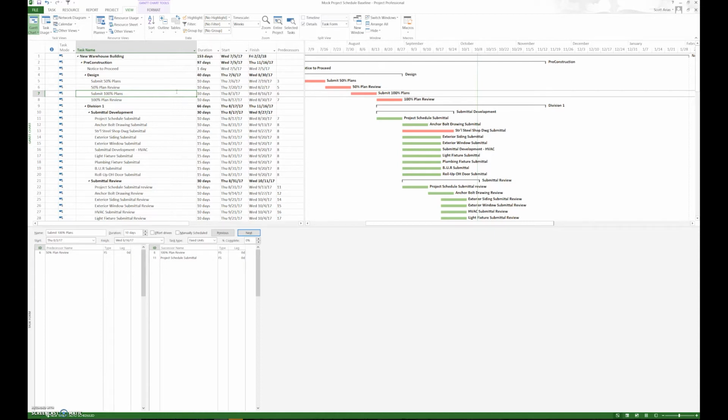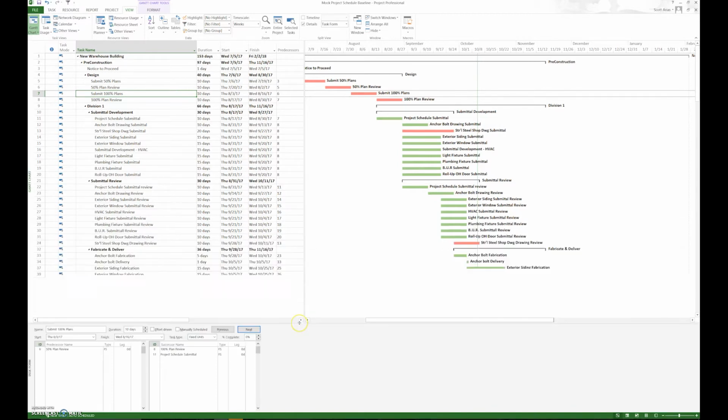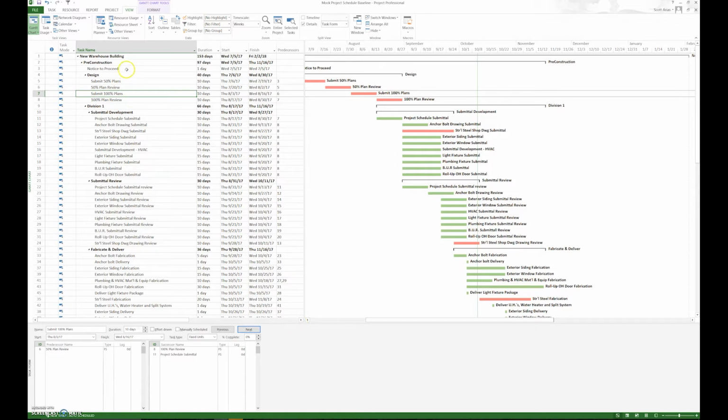By only assigning one, that'll allow you to prevent some redundancies from occurring. There are only 2 activities that don't have to have either a predecessor or successor. Notice to proceed, because it's the first activity, has no predecessor whatsoever.